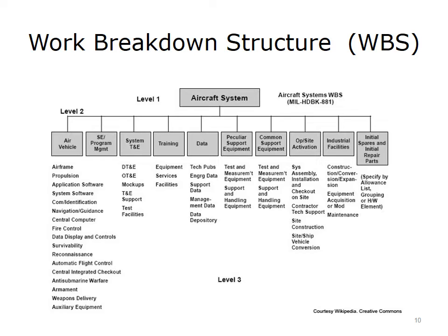Work packages are usually represented as one-person tasks, meaning that they reflect the time one person would take to complete that task. If you split a task between two people, it may still be only one work package because one person may do half of the task and the other person the other half.